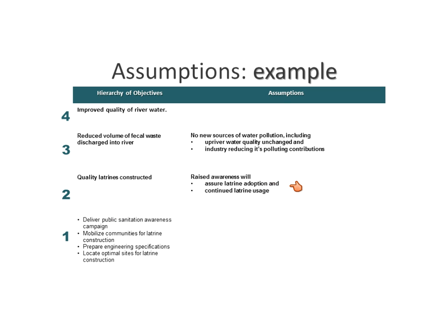All right, so an assumption is that raised awareness will assure adoption and continued latrine usage. Now that's a good assumption, because if you're raising awareness and it's not actually changing behaviors, then that's a problem. Your project's not going to succeed. This one's an even bigger one, and probably what we call a killer assumption, which means if this assumption doesn't come true, then this project is dead in the water.